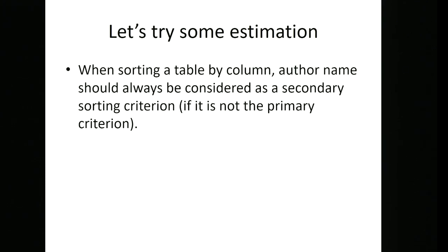So one thing that anybody who went for a longer estimate can be reassured by is that, generally speaking, people almost always underestimate the amount of time it's going to take to complete a task. And it could be that where someone's made a longer estimate, they might be including it being done. That means things like, fully tested and everything else. Whereas an assumption that somebody could make when they give a lower estimate is that they're not thinking about that.